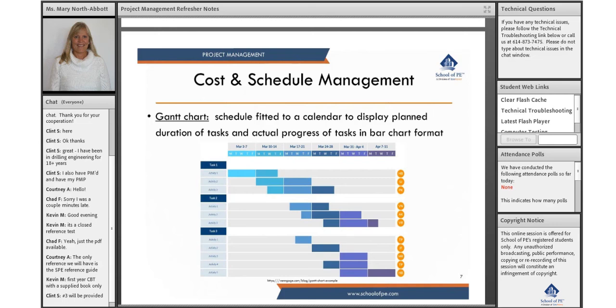And a lot of times you'll put not only tasks under there, but the people that are assigned to those tasks. And as you can see, a lot of these tasks, like task 3, are overlapping a lot with task 2. Task 2 is overlapping task 1. So these are all things that can be done in tandem, but I think it's a very useful way to lay out and schedule people's time for certain projects, but also to say, this is the amount of time it's going to take. And the bar chart format is just a useful way to do a big overview.